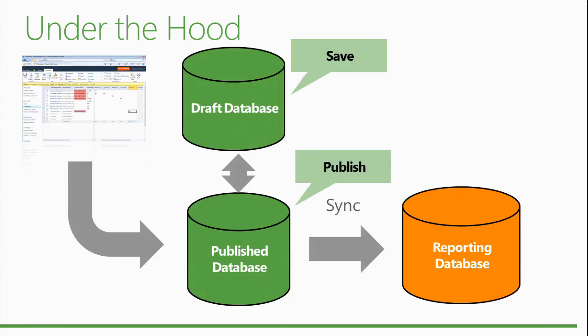So just a refresher about what's happening when you submit your timesheet. Let's say the single entry mode, or even if you don't use the single entry mode, because that applies also. Everything that is displayed and updated in PWA lives in the published database, right? Everything that is just saved from Project Pro, for example, lives in the draft database. And everything that is published also pushes data, after it has been updated in the published database, into the reporting database.